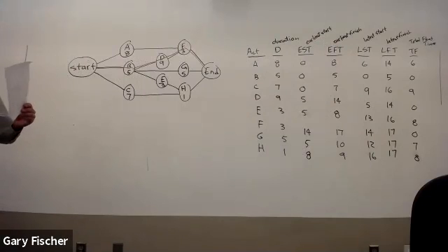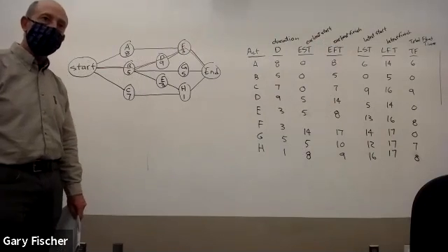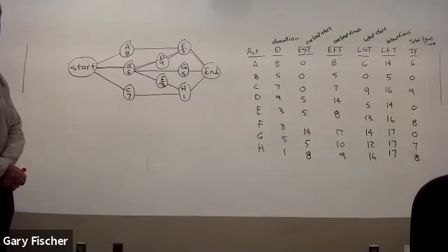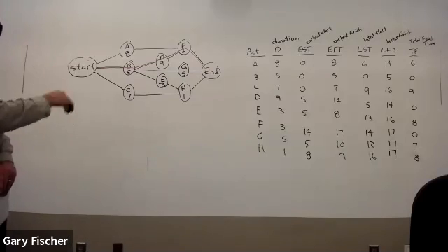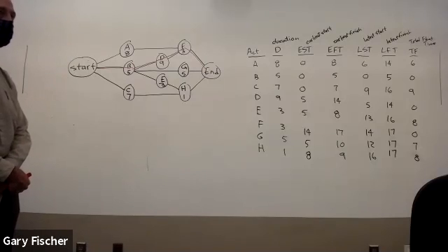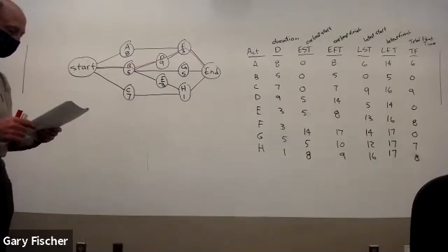Let me make sure that I've done this correctly. Yep. Just a coincidence too, but the critical path is the 17 days. So if you wanted to find out really quickly, you could glance and see, if I connect the dots, what's going to give me the longest days? And that's the critical path. Because at the end, you don't have any float at that particular point. Yep, that's great.